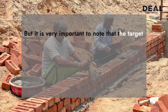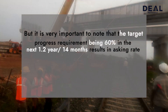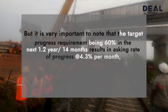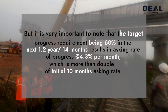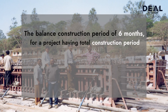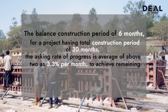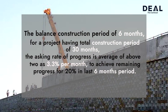It is very important to note that the target progress requirement being 60% in the next 1.2 years or 14 months results in an asking rate of progress of 4.3% per month, which is more than double the initial 10-month asking rate. In the balance construction period of 6 months — for a project having a total construction period of 30 months — the asking rate of progress is approximately 3.3% per month to achieve the remaining 20% progress in the last 6 months.